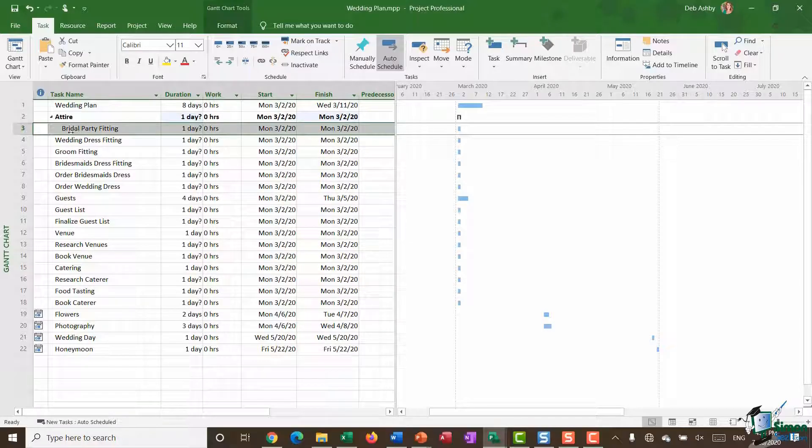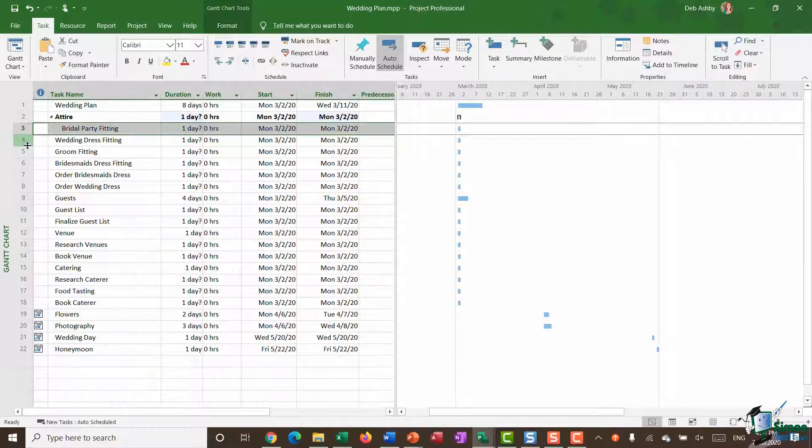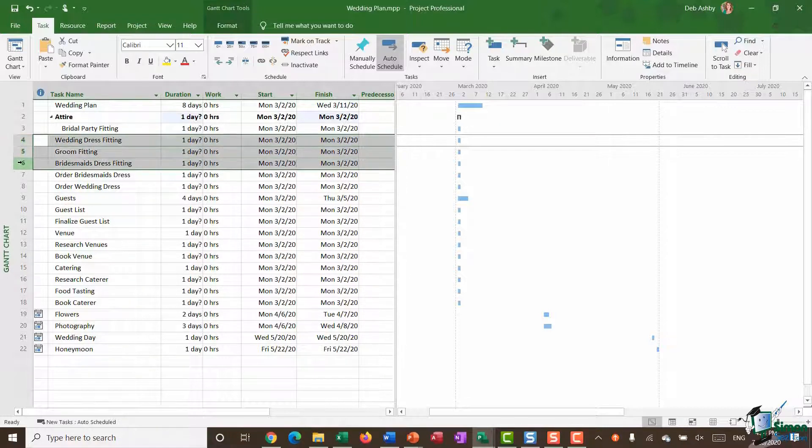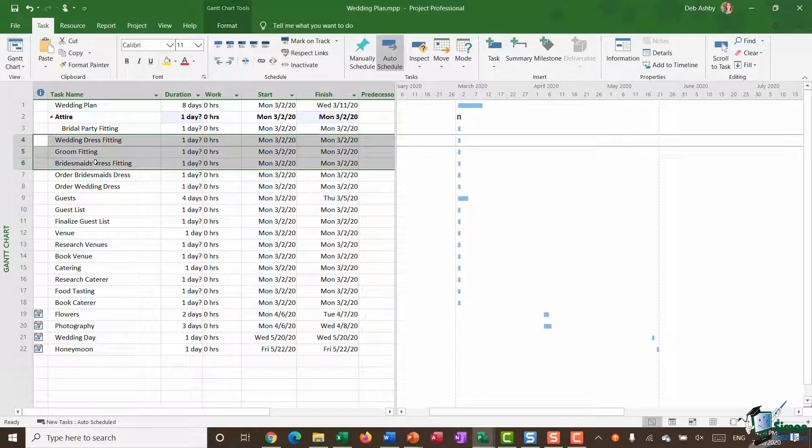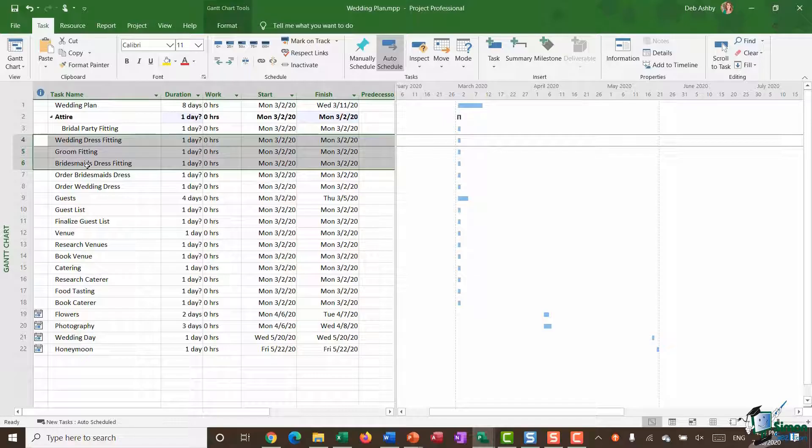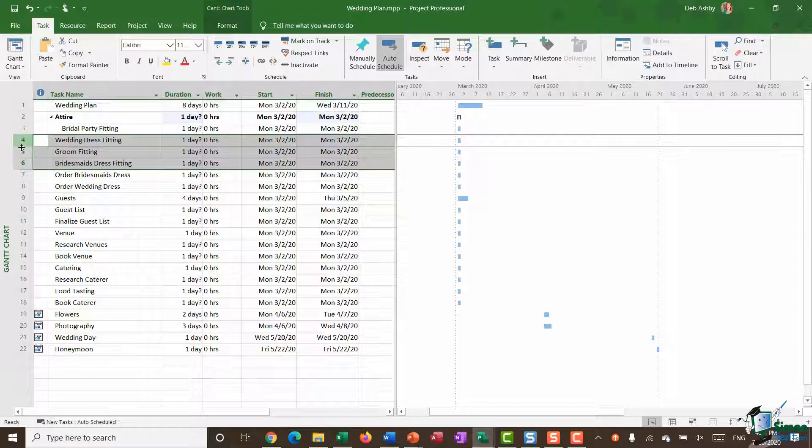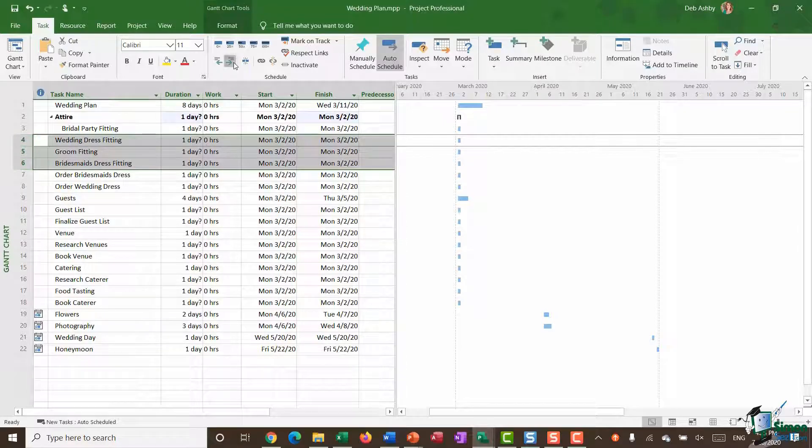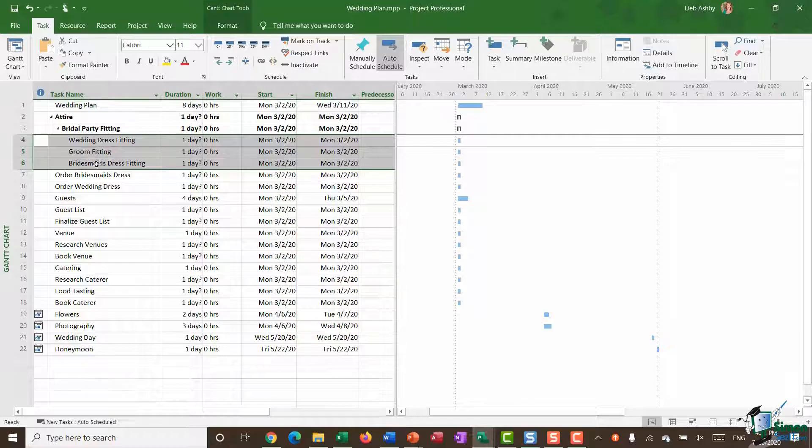Now what I can also do here is make subtasks of subtasks. So with bridal party fitting I can see that the three tasks below—wedding dress fitting, groom fitting, and bridesmaid's dress fitting—those three tasks are essentially subtasks of bridal party fitting. So I'm going to do exactly the same thing. Select these tasks, click on indent, and indent again. So now you can see that bridal party fitting is essentially a summary task and I then have my three subtasks.